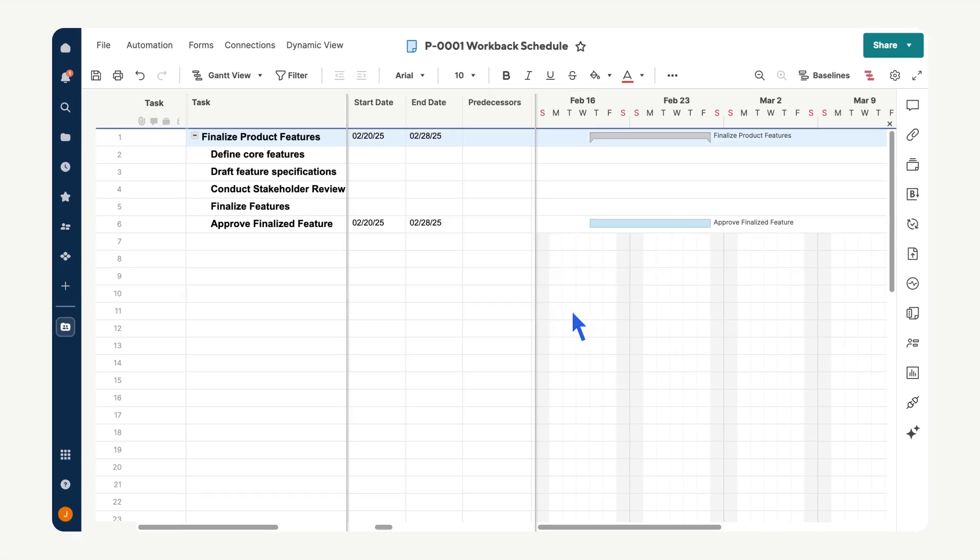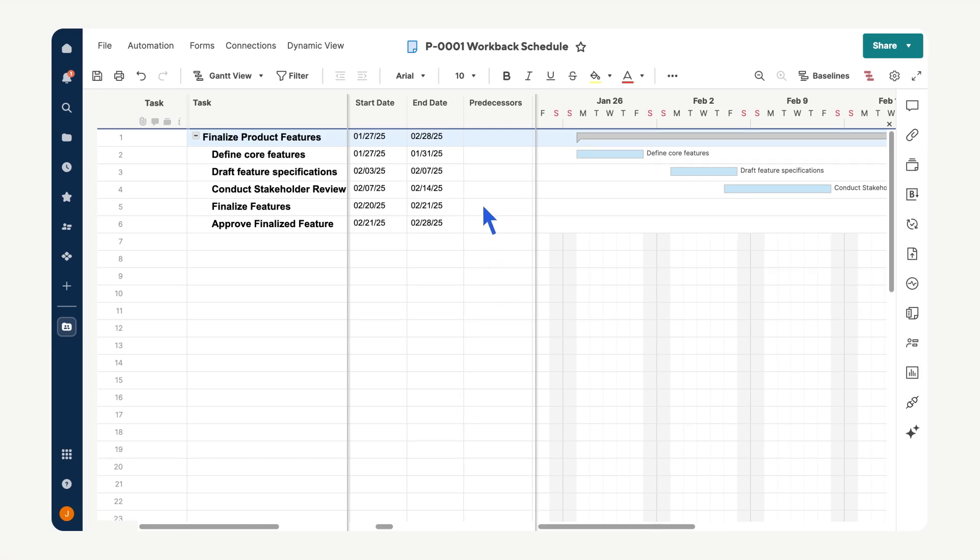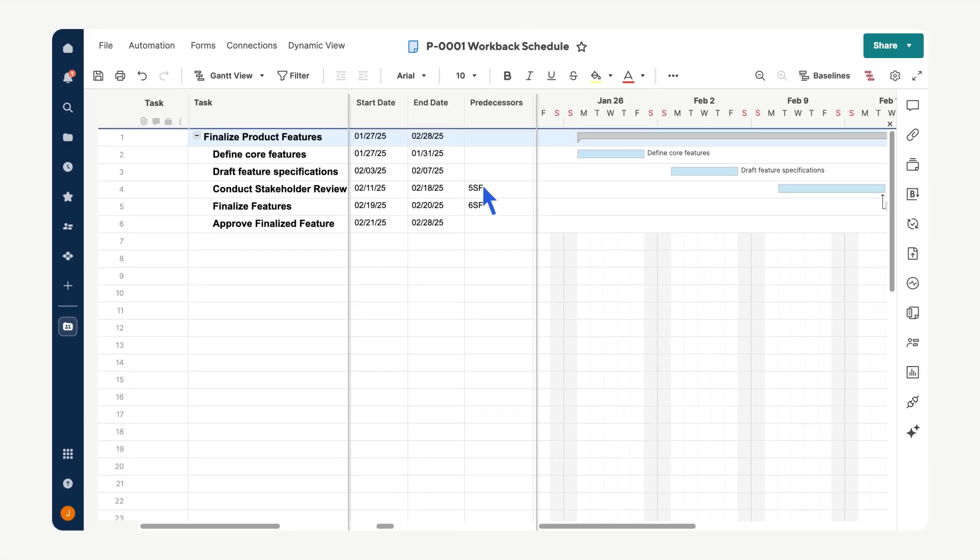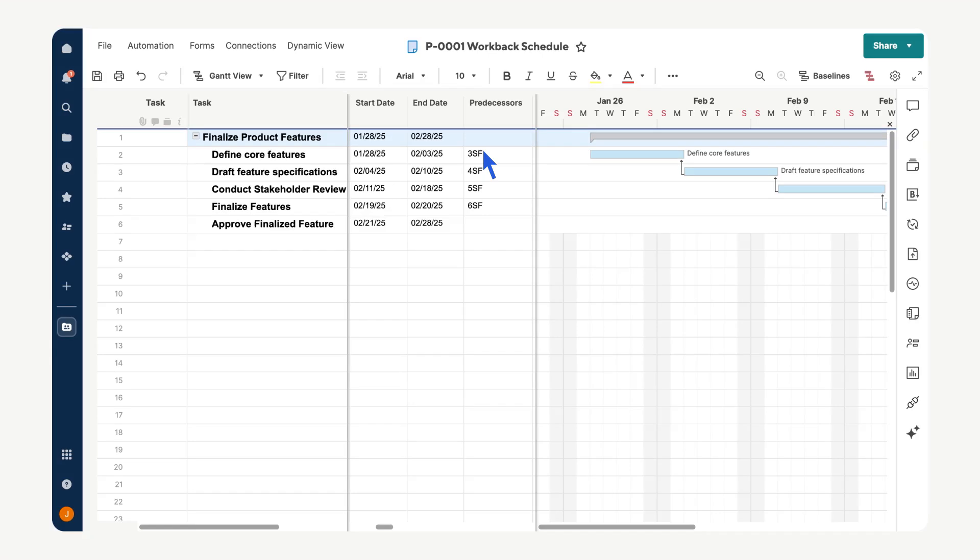Assign durations to tasks that need to be completed before the final deliverable. Define start-to-finish relationships between tasks. In this method, each task depends on the completion of the next task in sequence. This format is different from other dependency types such as finish-to-start and ensures tasks are correctly aligned for working backward.